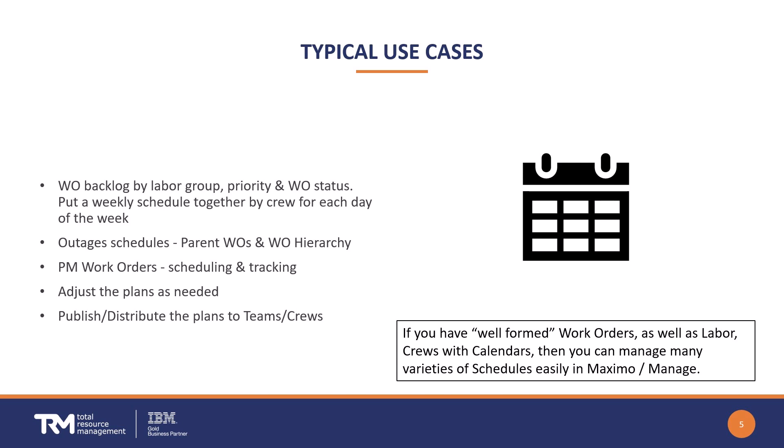And then certainly for any of these, you can adjust the plans as needed — as you make your changes, the underlying work orders get changed as well when you publish the schedule. Of course, publishing and distributing these schedules out to the different teams and crews is the final step.